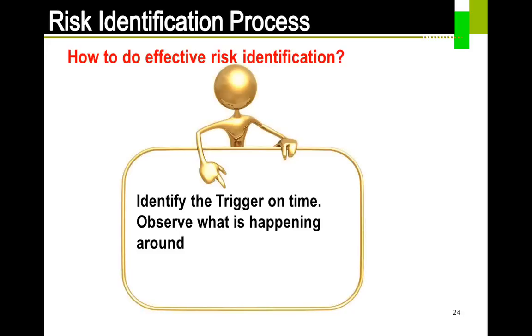Suddenly in the 16th week there is a schedule slippage. What I mean by schedule slippage is, you are supposed to deliver on that Monday, but you slipped by 3-4 days. That's a trigger, which says that yes, project manager, there is something going wrong. You just need to really look at what is happening. Probably that week it may not be a problem.